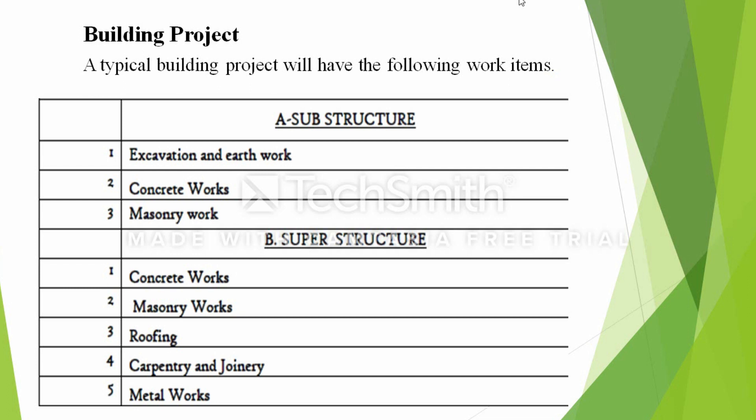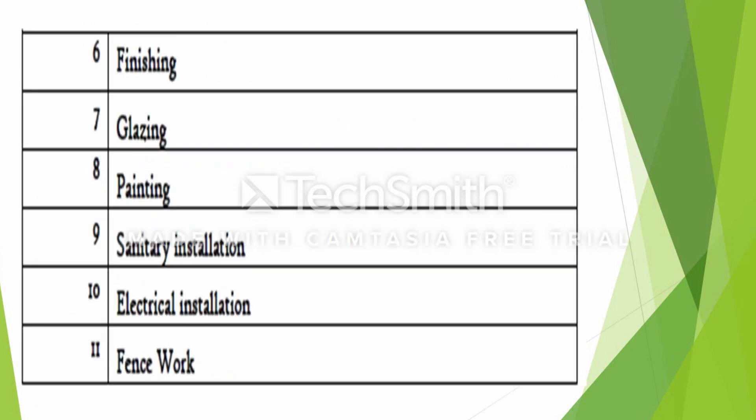If you think about the superstructure, you will recognize the foundation must be strong. The superstructure includes elements such as concrete, carpentry, metal, brass, and finishing — such as chalk, column, board. The superstructure also includes glazing, painting, sanitary installation, and electrical installation. Fence work is also done as part of the superstructure.